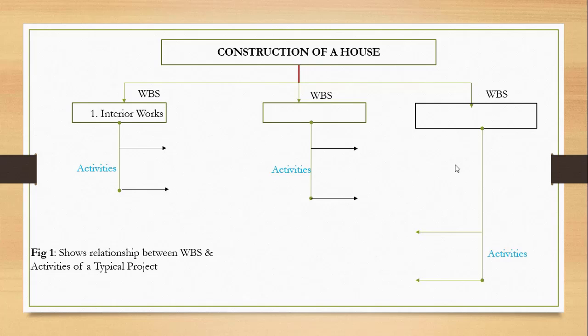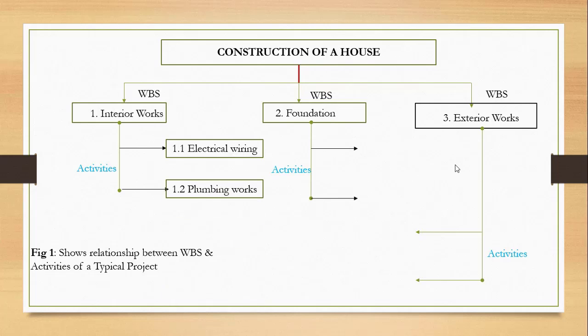So we can talk of the interior works of the house. We can talk of the foundation of the house, how we are going to excavate the foundation, and then we can also talk of the exterior works of the house. Under the interior works, we can have the electrical wiring, which will be considered an activity under the main work, which is the interior works, and we can talk of the plumbing works.